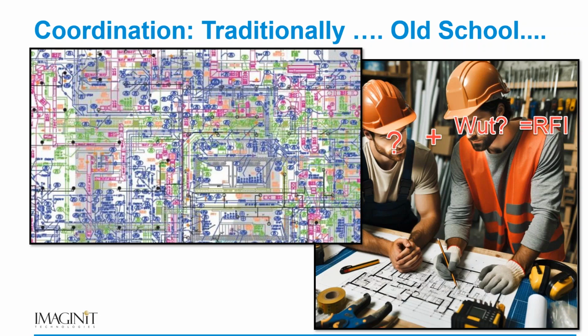Those create a time constraint. Whenever I have to ask a question, what does that question entail? Maybe an email, maybe a phone call, maybe 2 or 3 emails or phone calls, and ultimately we get something submitted to the person who's going to give me an answer on how to proceed. That could take, traditionally in construction, 2 weeks to respond. So if an engineer gets back to a contractor 2 weeks later, what were we doing for those 2 weeks? That has cost impact, that has real ramifications on execution of your building.